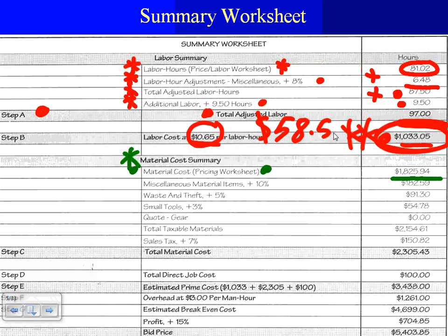Then miscellaneous. I added 10% miscellaneous on the material. Everybody knows when you add 10% to the number. So where did this number come from? The $182. Miscellaneous things that I might forget, so I threw in 10%. You don't have to. If your estimate is accurate, guys, and you know that you counted every single thing in your material, you don't have to throw in another 10. Okay? Here's 10. Take this. Feel free, and Chris, please feel free to agree or disagree with all this here.